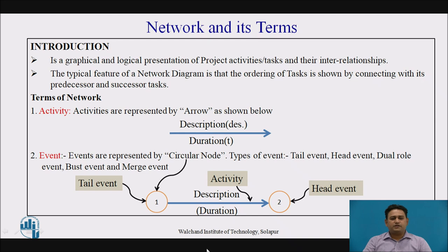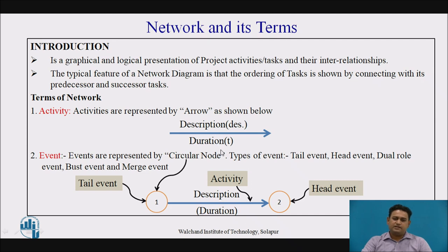Now, in this particular network diagram, we have to see the terms involved. The first one is the activity. An activity is a portion or part in the network diagram which is going to consume time as well as resources for its completion. Activities are represented by arrows. Here, we see arrows above which there is a description and below there is a duration. The description may be the name of the particular activity or task. The length of the arrow has no significance.